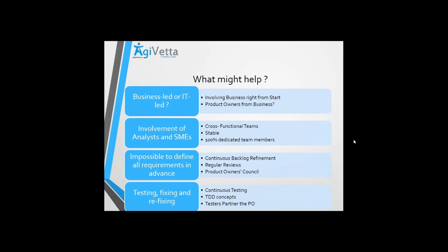And then if there are different modules that you're working on, you have different kinds of stakeholders that you're working with. These guys need to meet together so that the cross dependency, any conflicting data sets you're creating, conflicting records, conflicting reports, might be eliminated. So a product owners council might be a great idea, which meets regularly, maybe every week or every 2 weeks, so that you can work on any dependencies, any cross references which might be required, and so on.